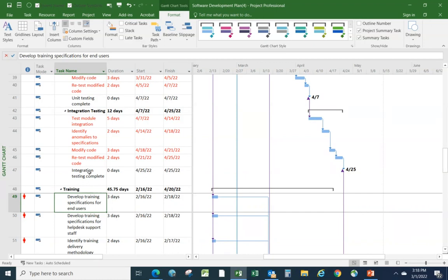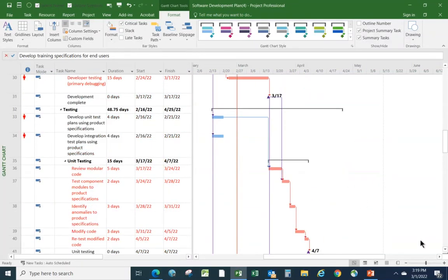So you could do that instead of having the bars red, or both. So on the Format tab, there's critical tasks here, and our bars are red. And wherever the bars are red, the text is red, and vice versa, because they're both triggered by the fact that a task is critical. Let's uncheck the bars over here.